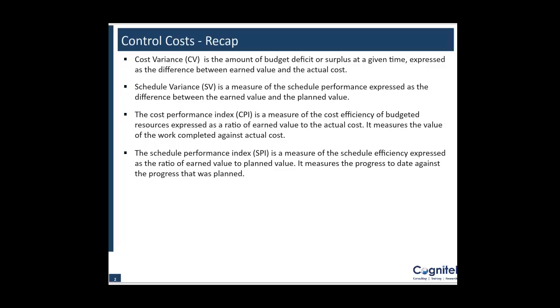And SPI shows you the scheduling efficiency, how much ahead or behind you are, which is EV upon PV, earned value upon planned value. That is what SPI, the schedule performance index, is.